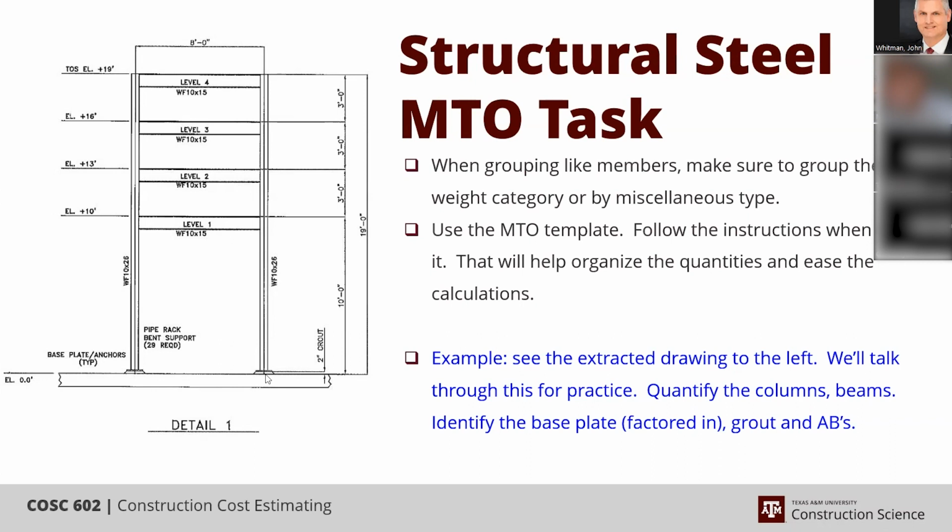On the light and extra light, we usually apply around 12%, and then medium 10, heavy 8, extra heavy 6, and then extra heavy 4. We just stay with 4. Okay. That's my memory. I'd have to go back and actually verify that, but I'm reasonably sure that I'm right.